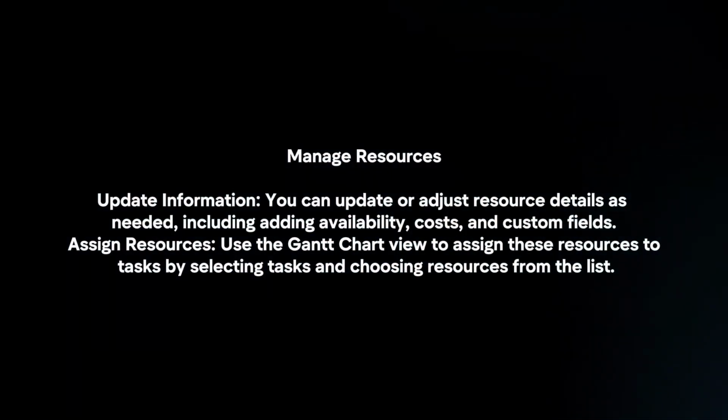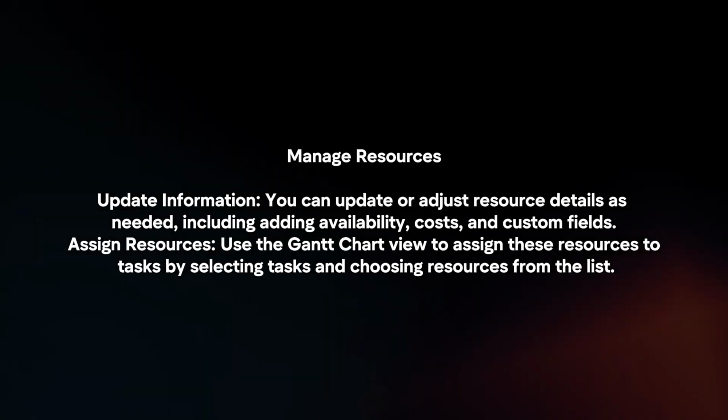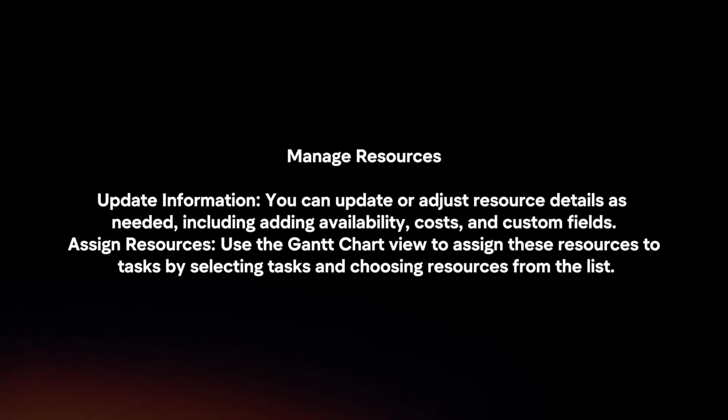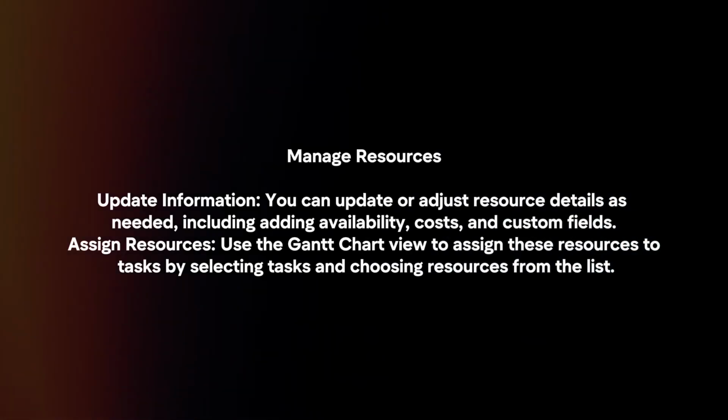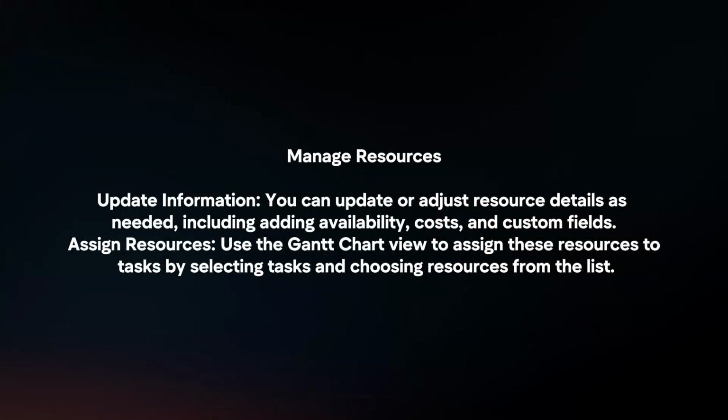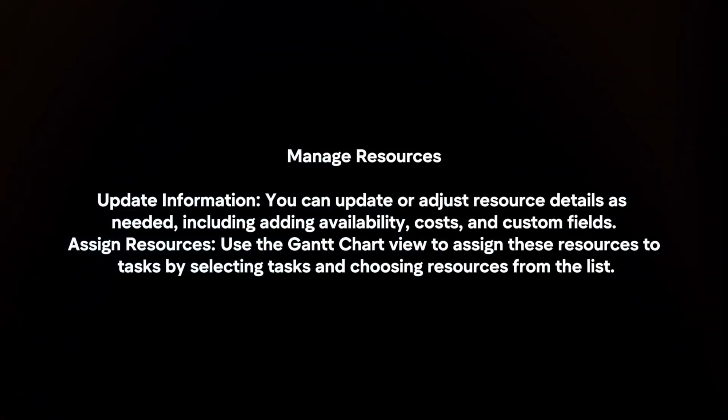Manage resources. Update information. You can update or adjust resource details as needed, including adding availability, costs, and custom fields. Assign resources. Use the Gantt chart view to assign these resources to tasks by selecting tasks and choosing resources from the list.